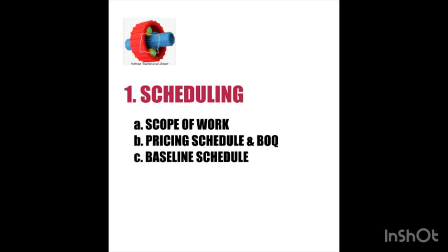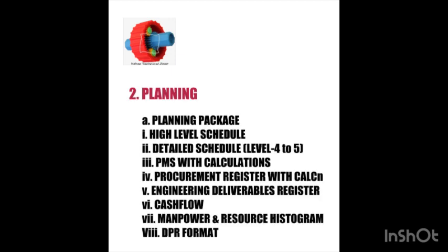If the schedule is rejected for any reason, there may be several reasons. If it is rejected, they will reject it with comments, so you can incorporate those comments by referring to the CRS, comment resolution sheet. There will be a format in your company, you can get that from your colleagues, and get approval for the same.